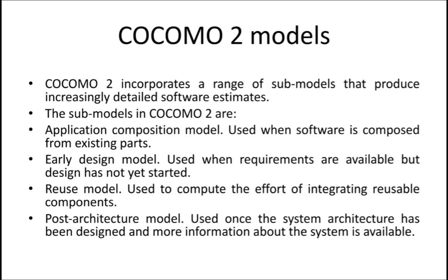The reuse model is used to compute the effort of integrating reusable components. When you use reusable components in your software and want to find the cost estimation, you go for the reuse model. Next, the post architecture model is used once the system architecture has been designed and more information about the system is available. Whenever the architecture of your software is completely ready, you can go for the post architecture model to do this effort and cost estimation.